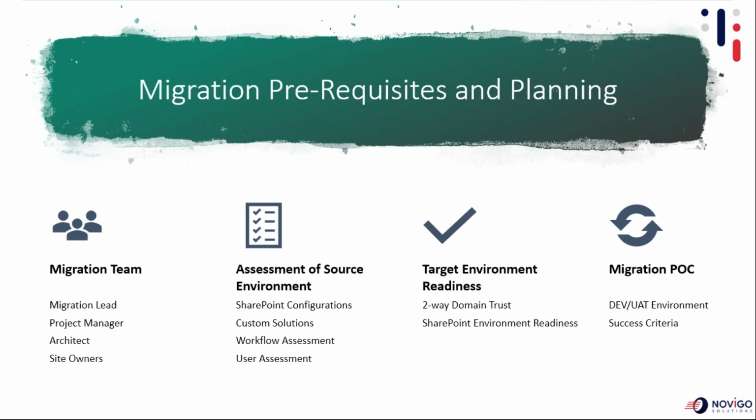Based on the size of your SharePoint farm and the number of users that you have in SharePoint, the migration team could vary. Assessment of your source environment: this section takes a look at your SharePoint configurations, your custom solutions, your workflows, the number of users, permissions, etc. Target environment readiness: you need to set up two-way trust between your domains or forests depending on your environment, set up your SharePoint environment in the new domain, keeping in mind the best practices to be followed while setting up the SharePoint servers. And the migration POC to ensure your success criteria is met.